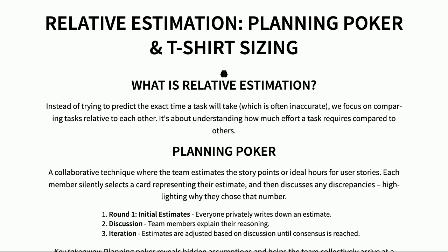Another technique is t-shirt sizing. This is simpler. We just assign sizes like XS, S, M, L and XL to represent the effort involved. It's a really quick way to get everyone thinking about relative size and building consensus.